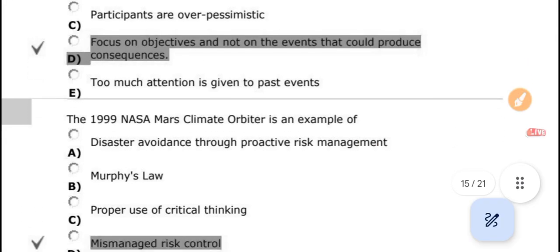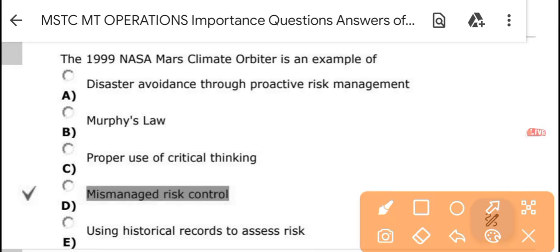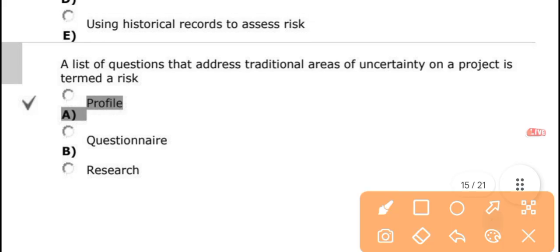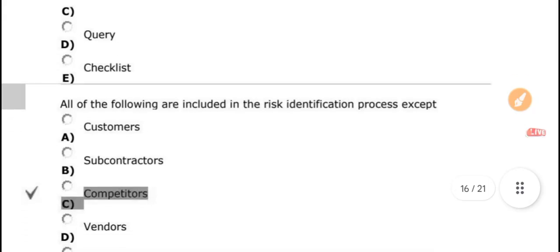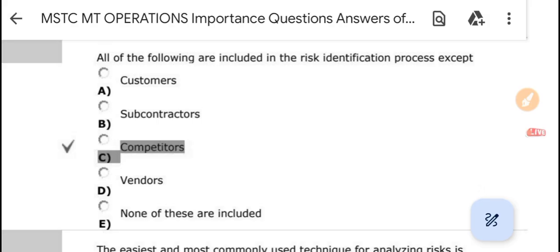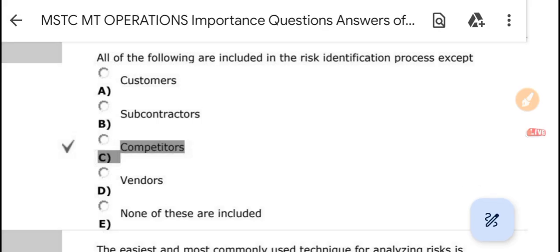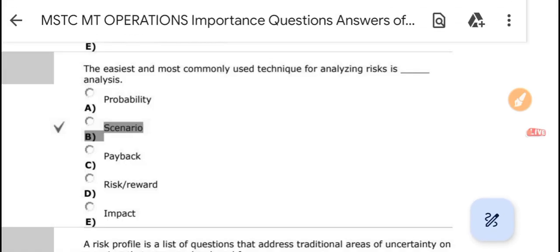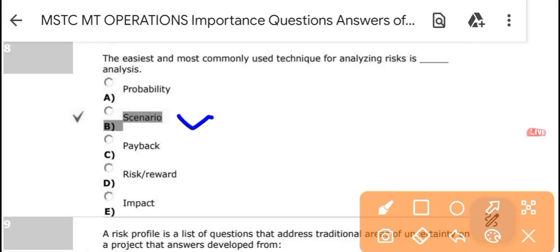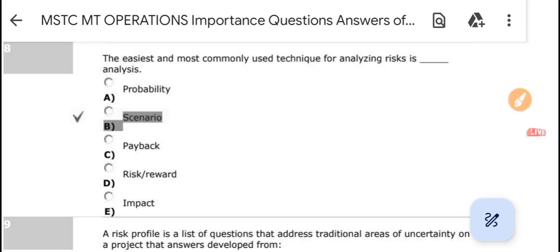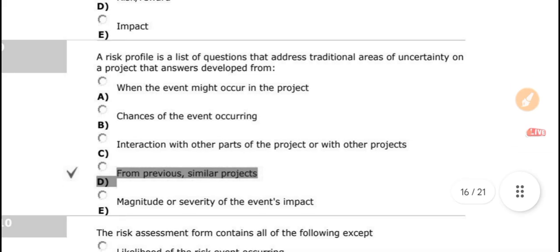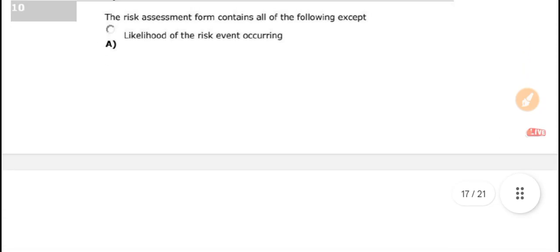One common mistake early in the risk identification process is focusing on objectives and not on events that could produce the consequences. In 1999, NASA Mars is an example of mismanagement of risk control. The list of questions that address traditional areas of uncertainty on a project is called a risk profile. All of the following are included in the risk identification process except expert competitors. The easiest and most common technique to analyze risk is scenario analysis.